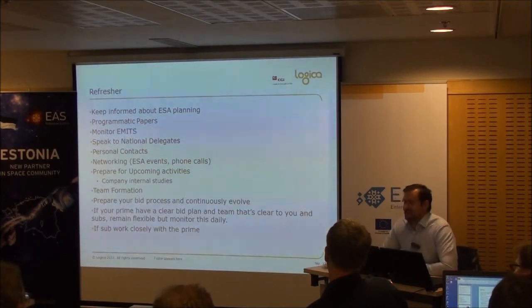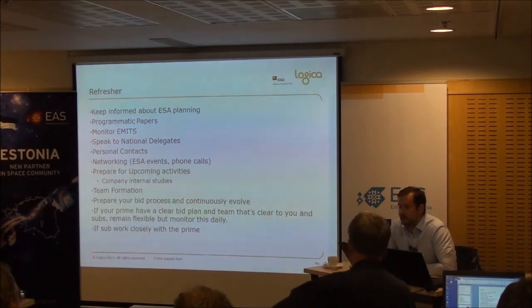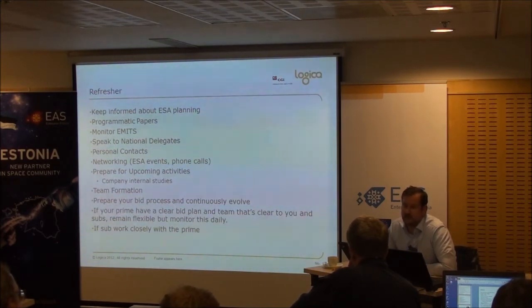I would say, honestly, it depends on what type of contract you're in. In R&D and study contracts, there's a potential for failure. Things can go wrong. It depends on what's gone wrong. If your subcontractor gets up and disappears, sorry, that's not going to be a good enough answer. They're probably going to expect you to carry the can there and deliver something. But it's unlikely they'll have too stringent a fixed penalty.